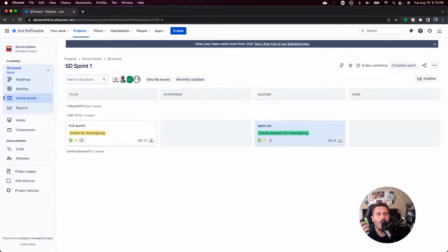This is how we end up with a mismatch between what your developers are sharing during a daily scrum versus what the tool reflects. And Jira, let me break your heart here. Jira is completely useless if it doesn't have the most up-to-date information. Jira always has to be updated to reflect reality, to reflect what's actually happening, which is why Jira empowers us with these status columns so that we can appropriately capture what's going on in the workflow of the work we're supposed to be working on, right?